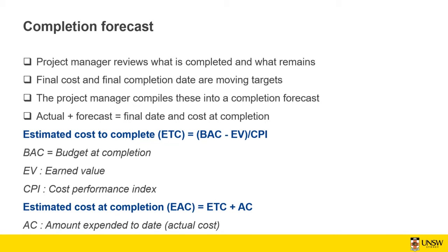It means that if your planned value at that time is 100K, but only 2/3 of the job is done by that time, your earned value is going to be 2/3 of 100,000, which is your planned value. I think I just answered this question. So it's the percentage of the completed task, but in budget terms.